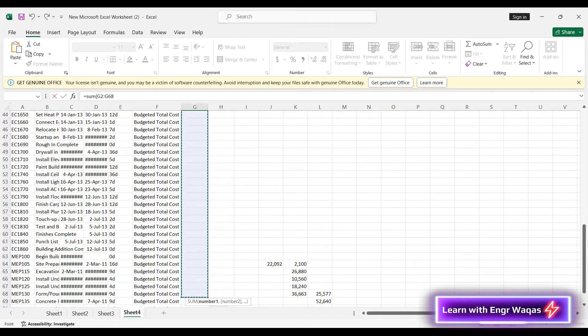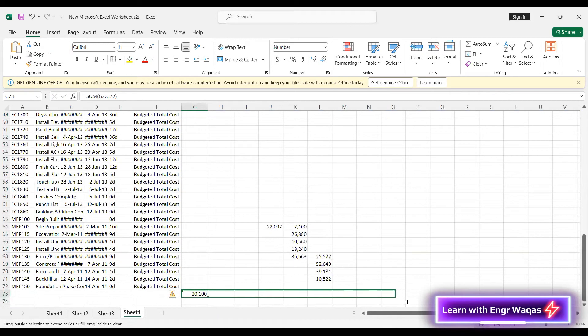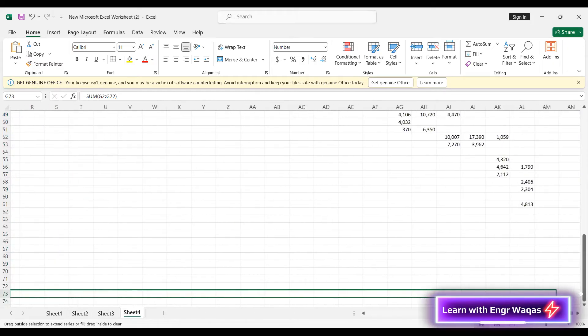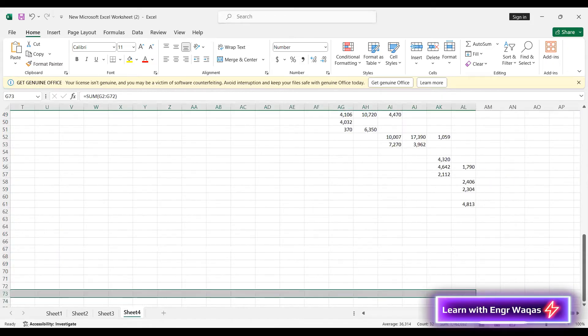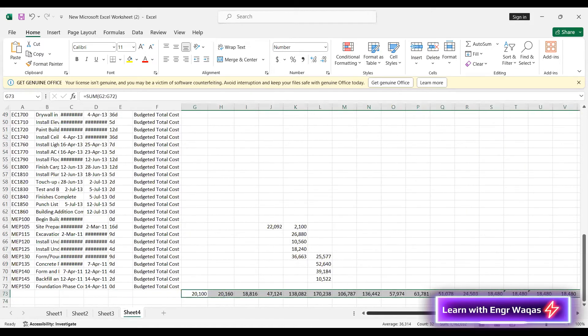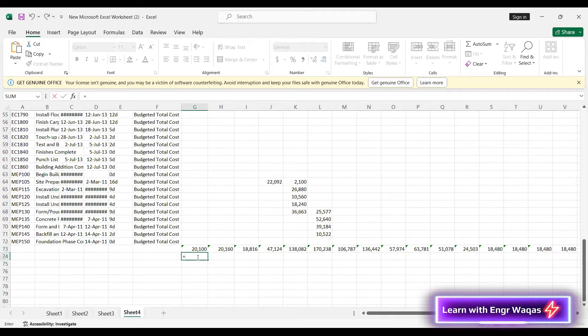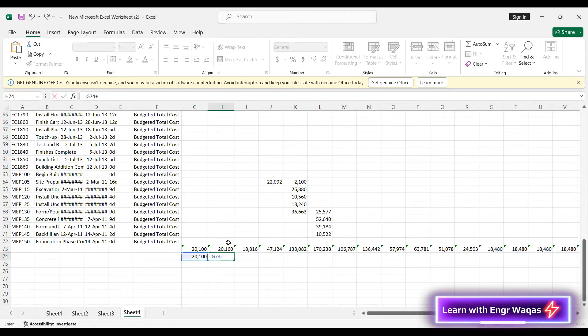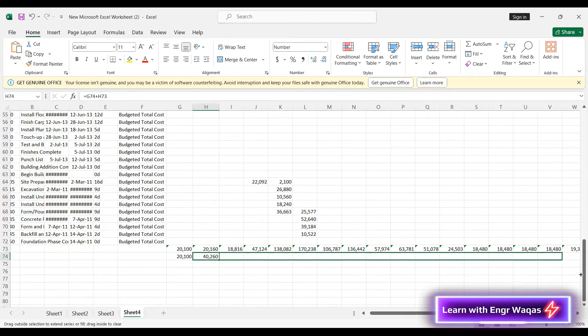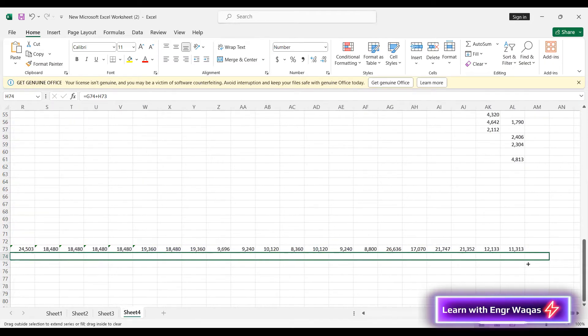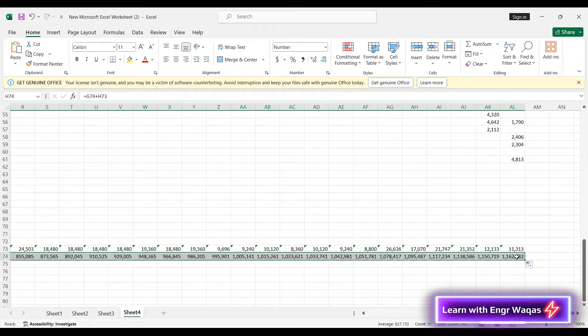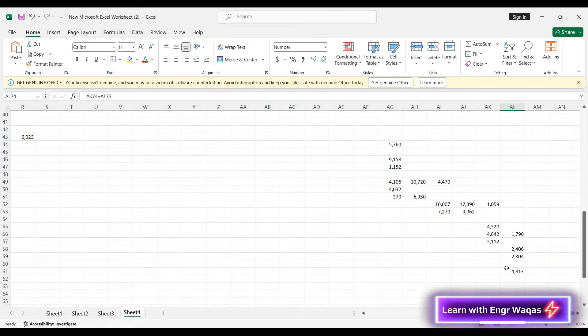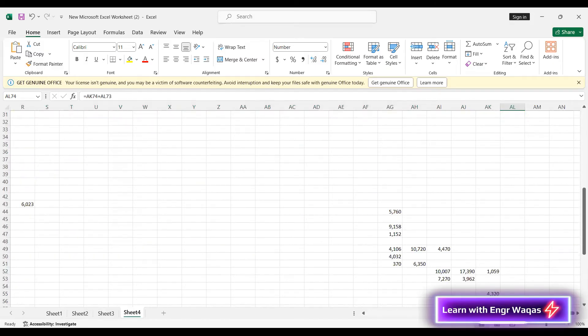And by doing this, I will be okay. Enter. And I will spread this formula along my right side as well. See, up to this one. Formula is applied already. Now I have to apply cumulative formula. The first value will come as it is with the equals formula, and the second value will come with this previous value plus the above one given in the next window. And now spread this value as it is. See, got it. So this should be your total project cost. That should be the verification of your project total cost.